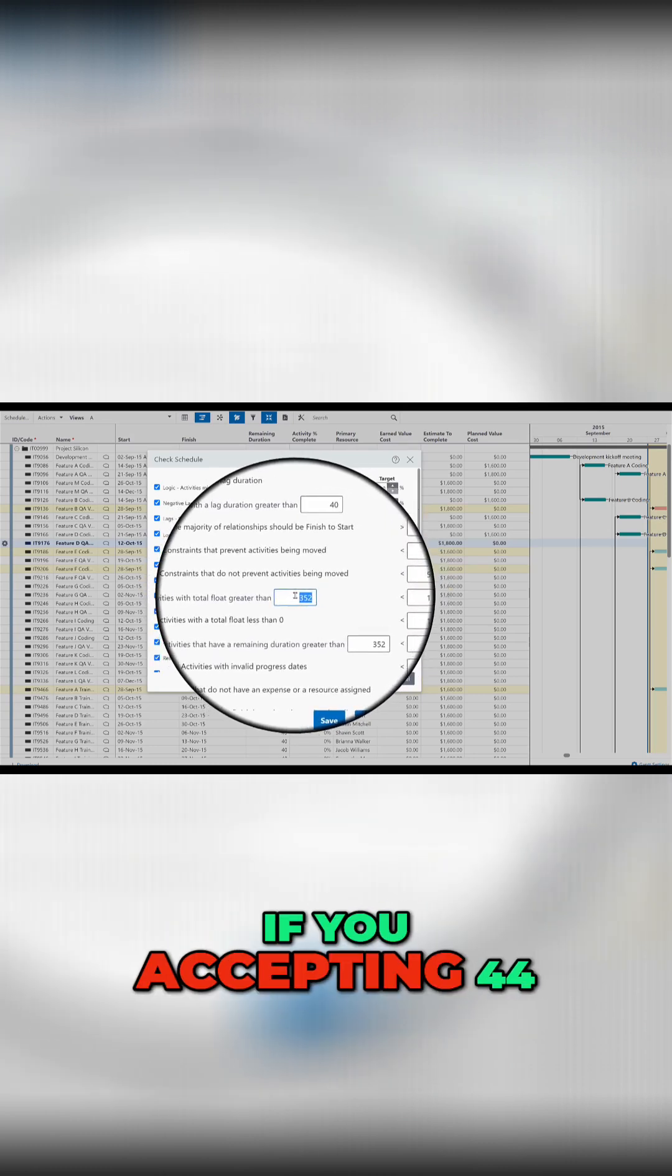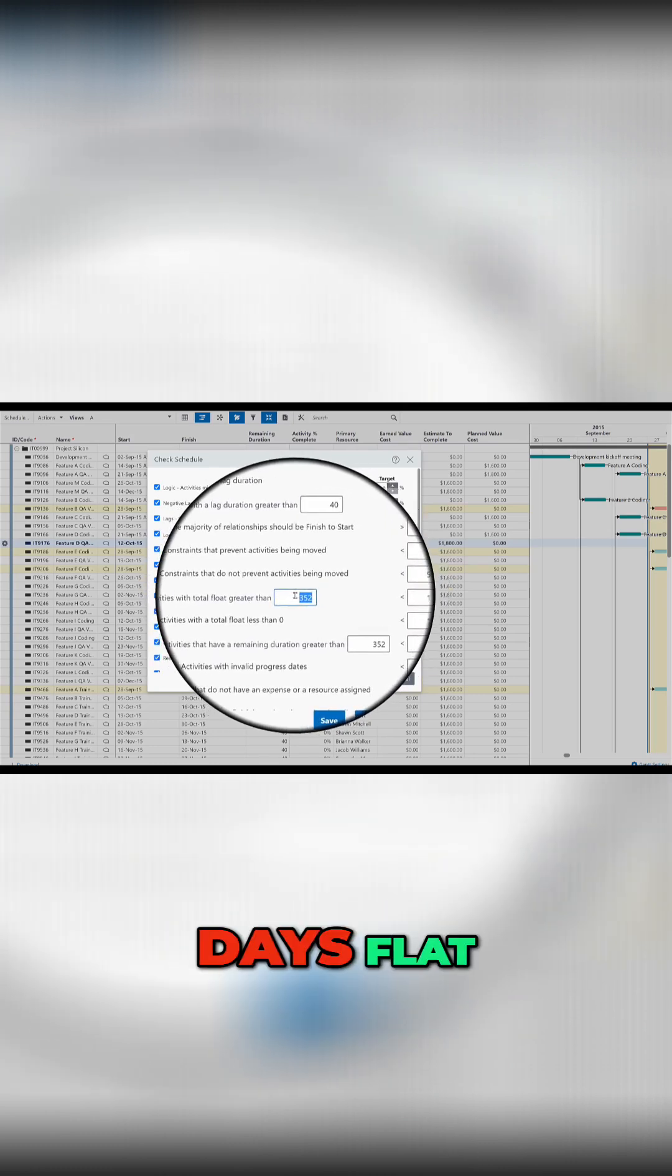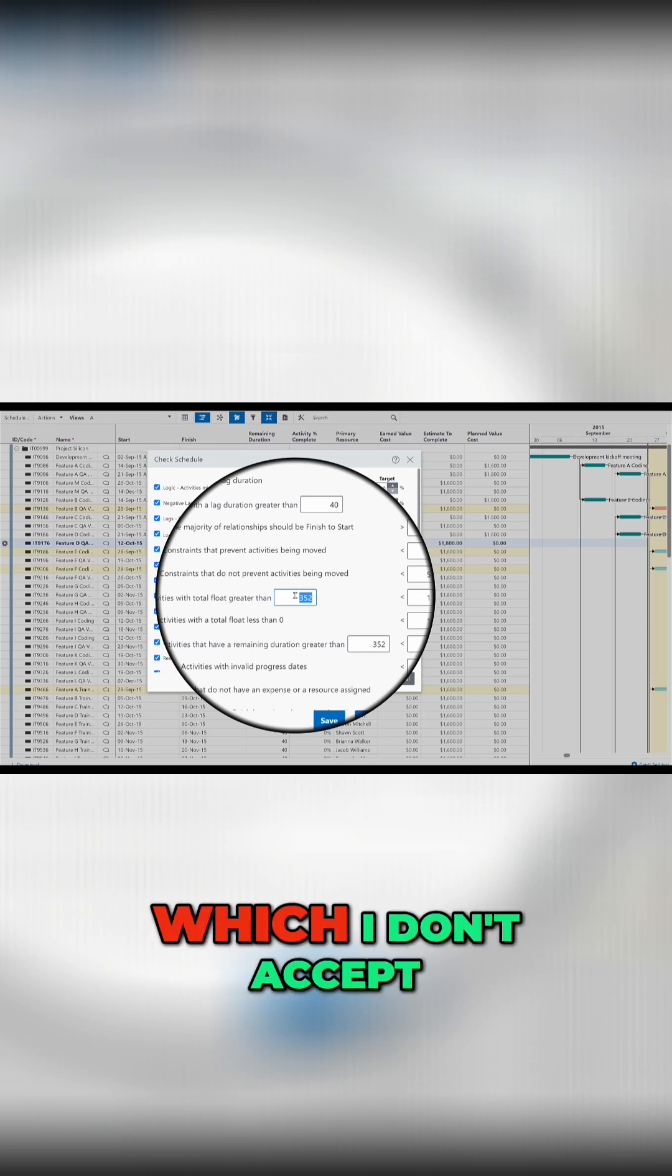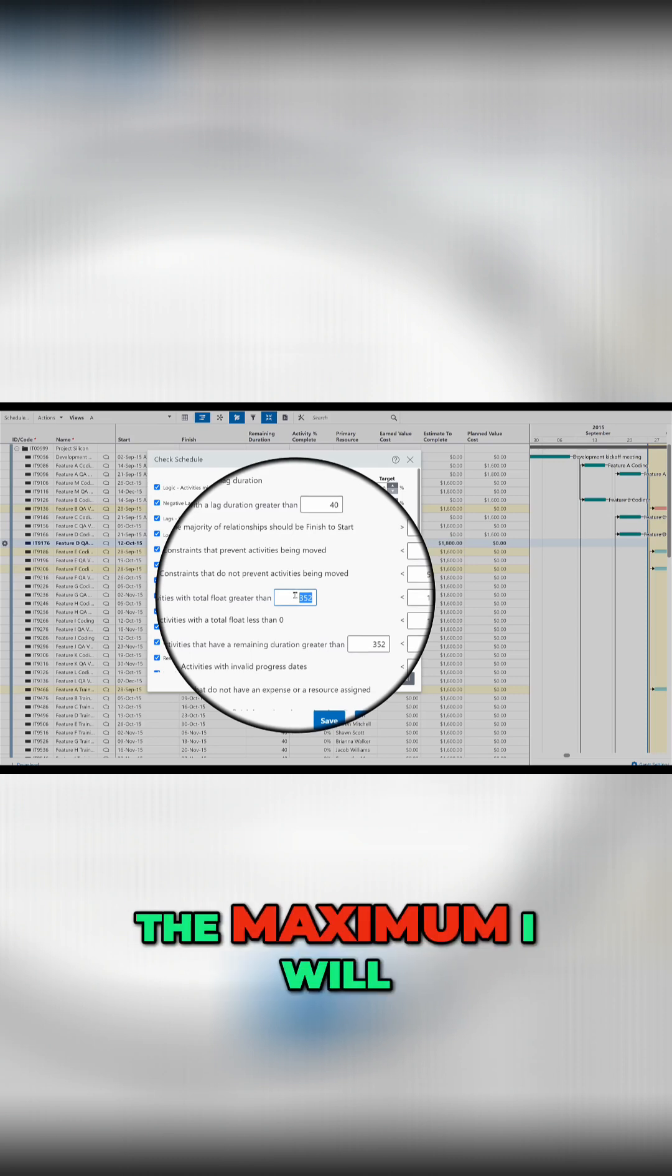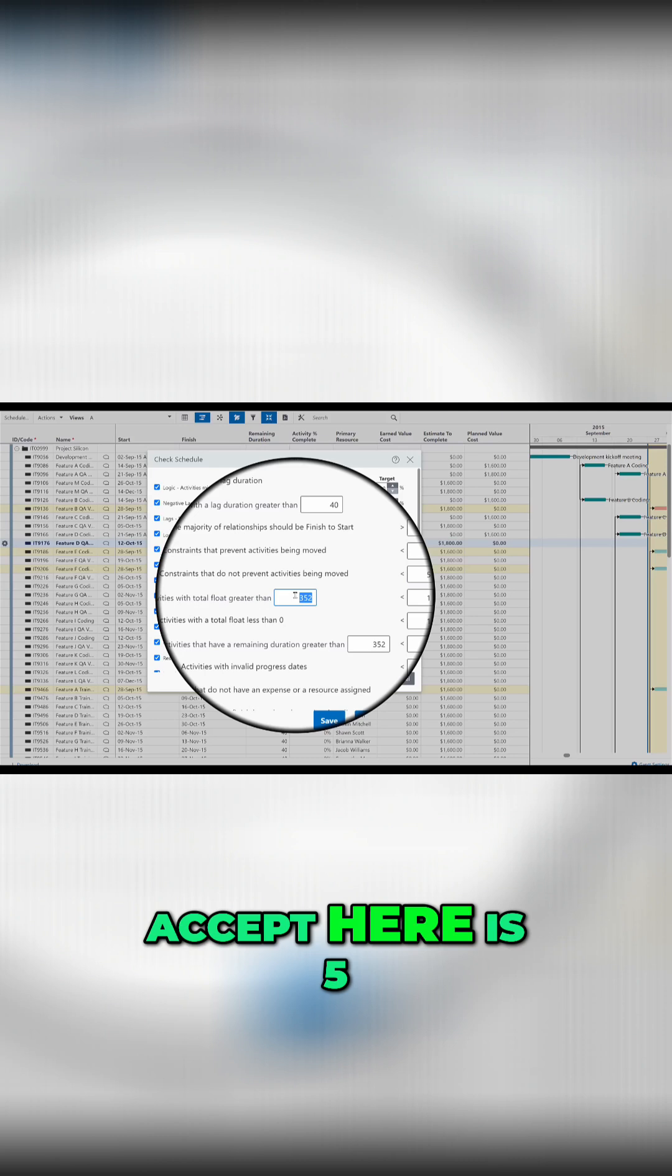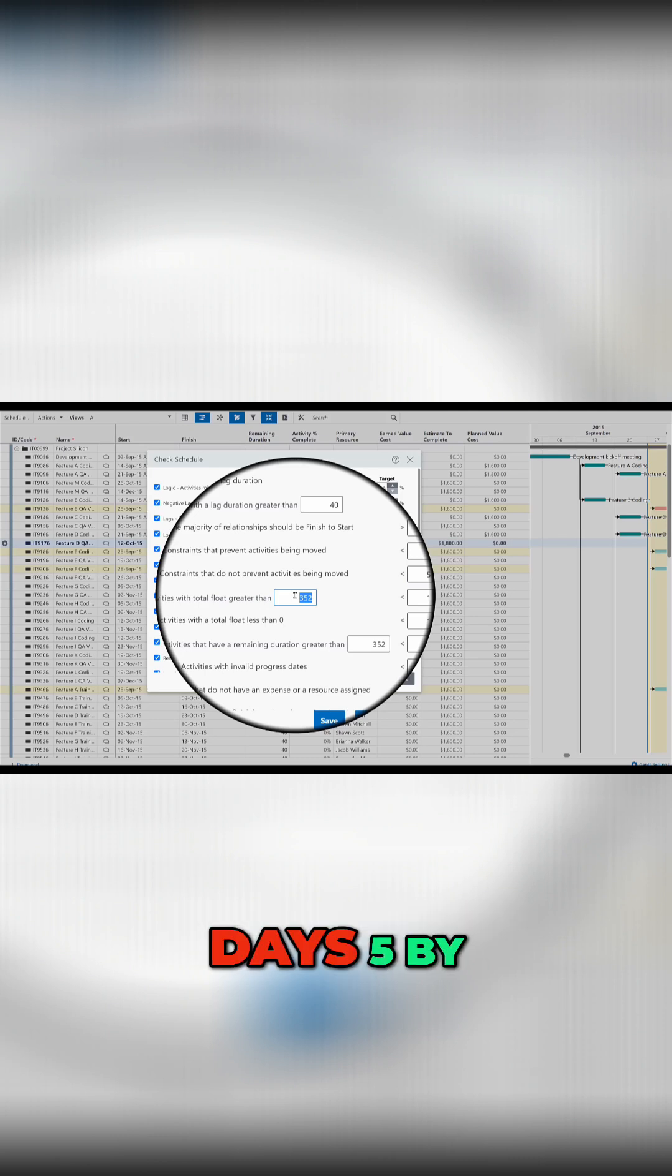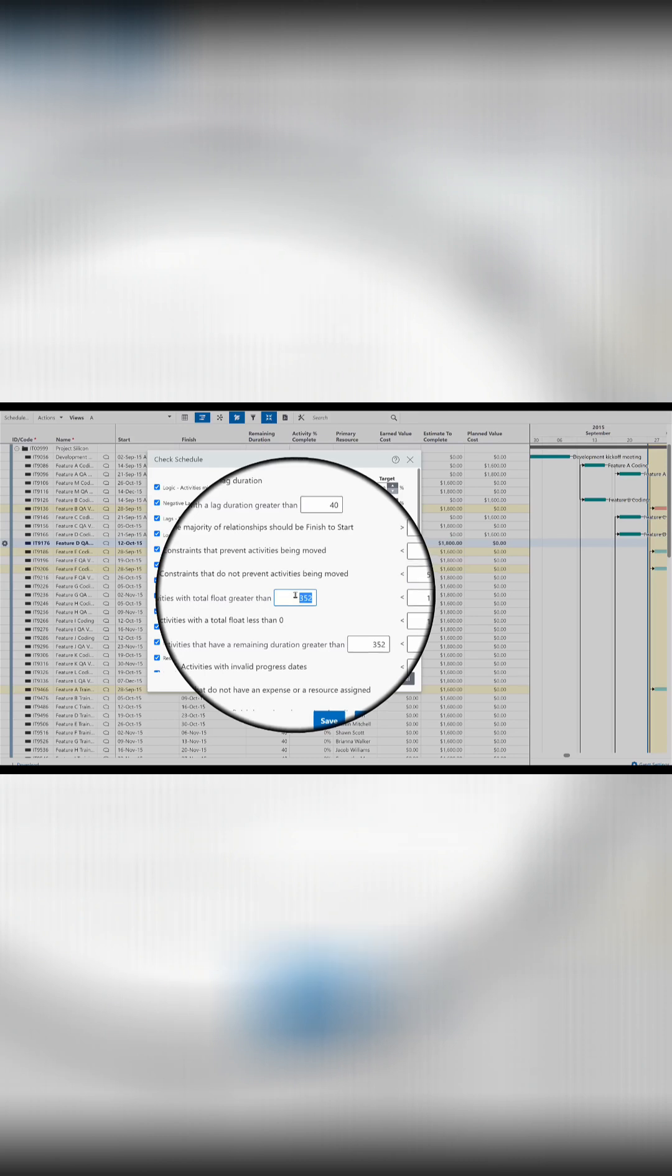So you keep it if you're accepting 44 days float, which I don't accept actually. The maximum I will accept here is 5 days. 5 by 8 hours.